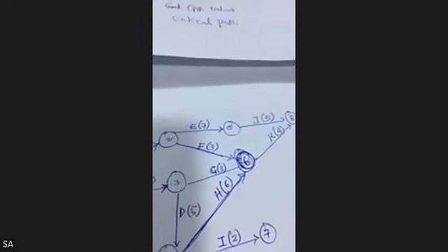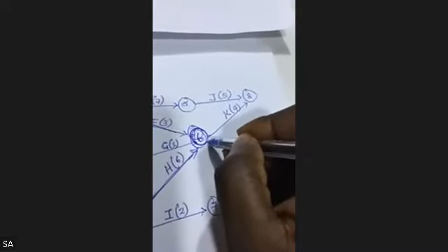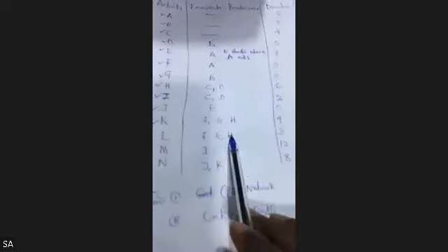So this is sorted. Now let's look at L. Very, very important. L also comes from FGH. So L is an offshoot of FGH. So this is L, node 9. What is the duration for L? It is 3. Now, since L is not the predecessor for any activity, L becomes a terminal activity. Take note, we'll call it an ending activity.